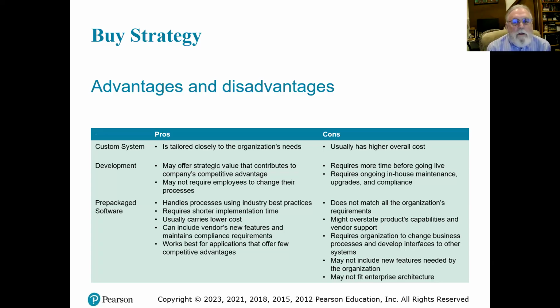The key there is not to overly try and customize it. As we saw with some of the failed ERP implementations, it was because rather than change the business processes, they wanted to change the new ERP system to match the current business processes. The more changes you make with an off the shelf software, the more expensive it becomes.